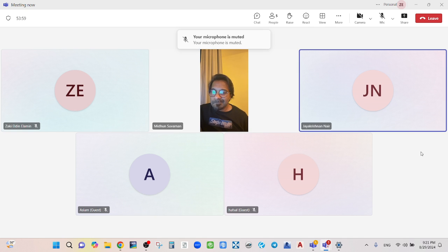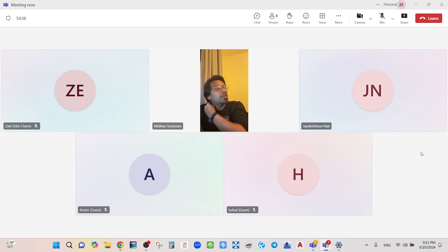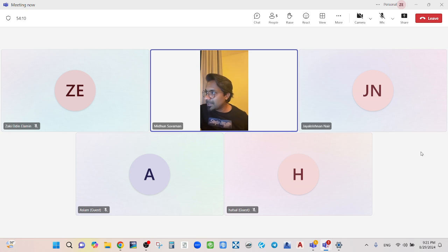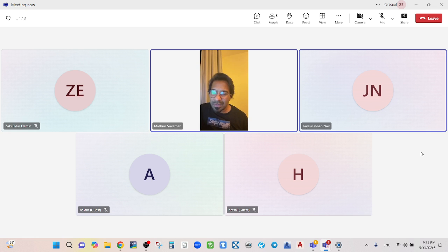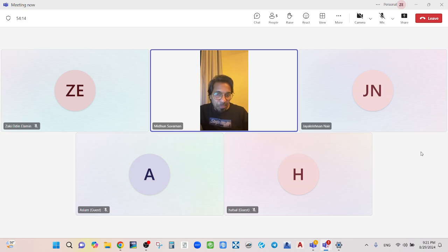Sir, one doubt. Yeah. Is this tender bond also included in the bid amount? No, it's a separate guarantee actually. Okay, fine. Normally they don't put that amount in the tender because that amount may put them at L2 instead of L1. They know that they will get this amount back for sure, and instead of that, they include the performance security amount in the bid amount.